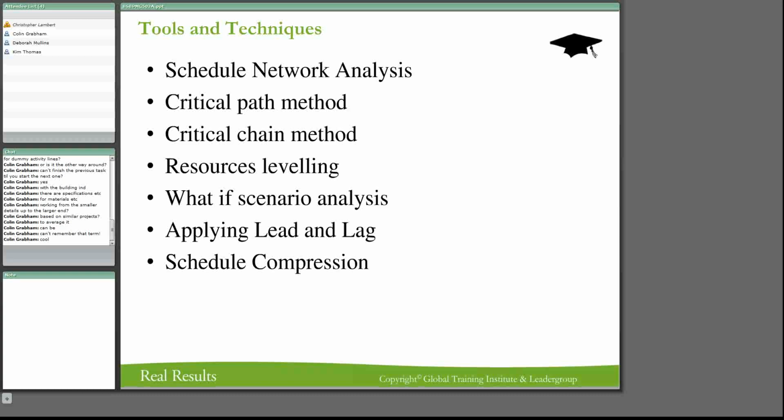So, to do resource leveling, where you've only got limited ones, what you're also going to try and do is what you would call a what-if scenario analysis. So you're going to say, well, if I add some things over here, what is it going to impact the project? And what you'll see is it's going to change your critical path. Does that make sense what I'm saying? Oh, it's so hard to put this across. I hope I'm coming across all right.